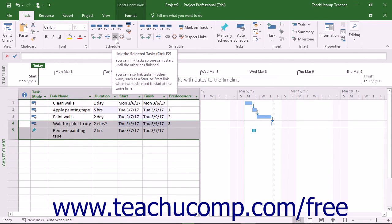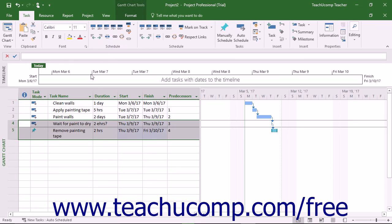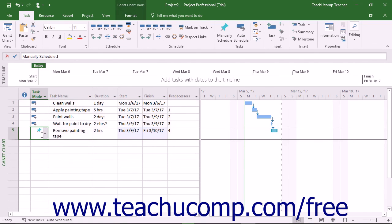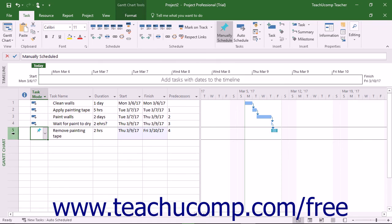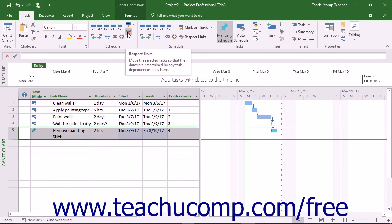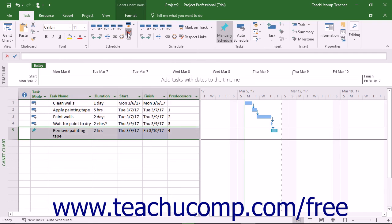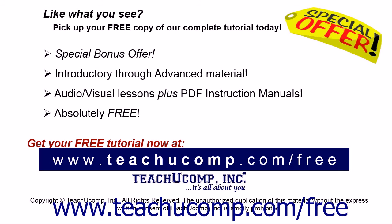If you did not create new tasks using the New Tasks Auto Scheduled Task Mode, but instead used the New Tasks Manually Scheduled Task Mode, you can still update dependency links between tasks. To do this, select the manually scheduled dependent tasks within the list to update. Then click the Respect Links button in the Scheduling button group on the Task tab of the ribbon.